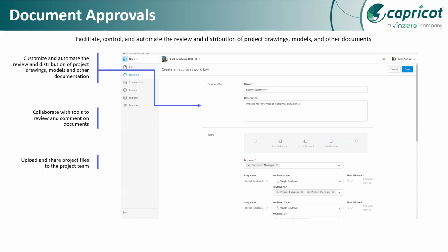So technology is there, but some manual intervention will always be required. When we are working with the 2D environment, the visualization, and the ease with which we can calculate the quantities from the 2D environment, becomes much easier. We can create those formulas, and then the digital activity starts happening, and the quantification becomes much easier. The manual intervention of calculating everything and documenting everything becomes easier. We still will have to create formulas, we still will have to select the elements for quantification and get the total QTO generated from both your 2D and 3D.